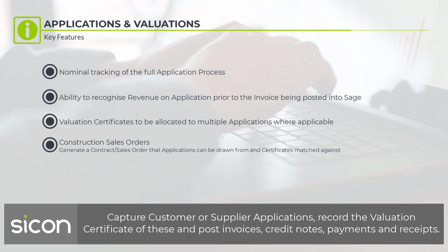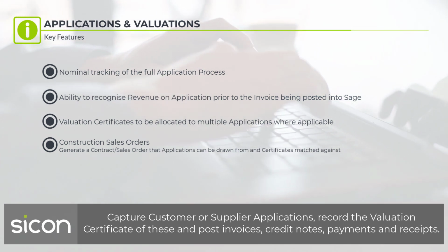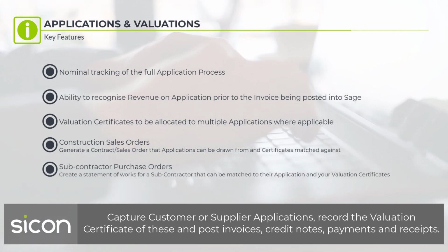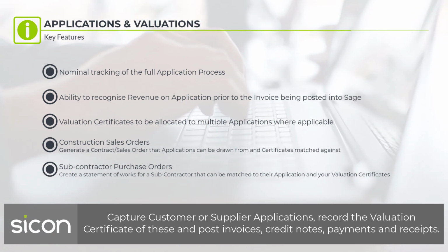construction sales orders: generate a contract sales order that applications can be drawn from and certificates matched against. Subcontractor purchase orders: create a statement of works for a subcontractor that can be matched to their application and your valuation certificates.